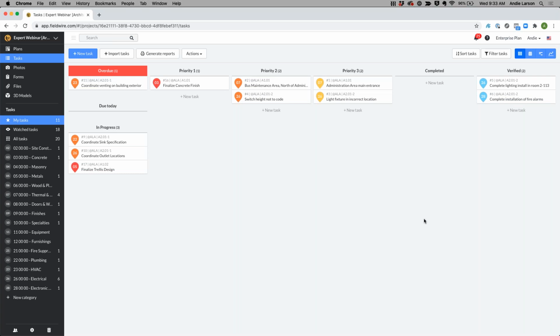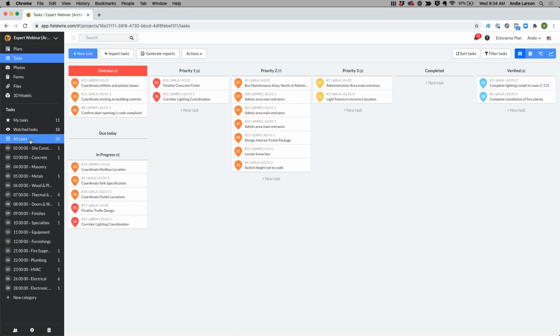As we talked about with the site observation report, we're also able to slice and dice this information and generate reports based off of certain open items. So I could create a report of all the open items that have to do with a certain category, or all open items that I specifically have to work on, or one of my other consultants or team members has to work on. So this will just make sure everyone's accountable and you have all this information in one spot.